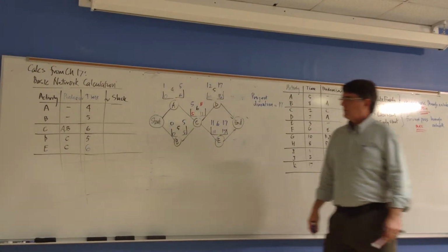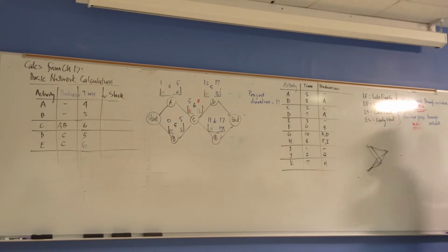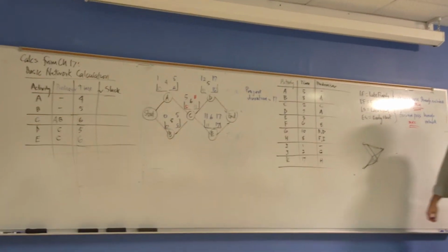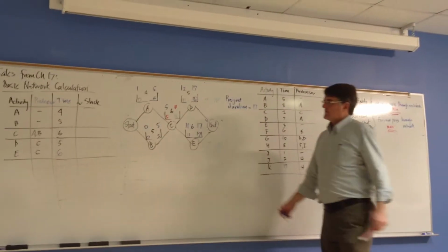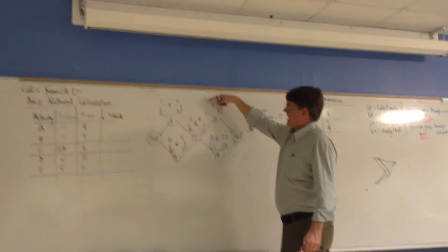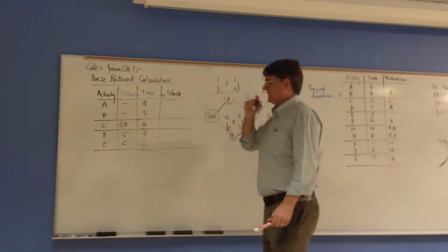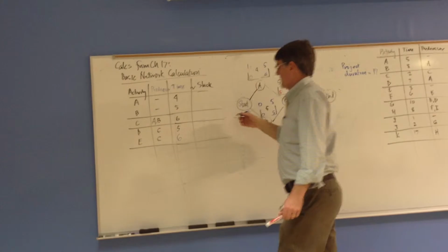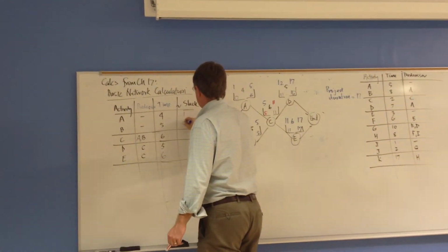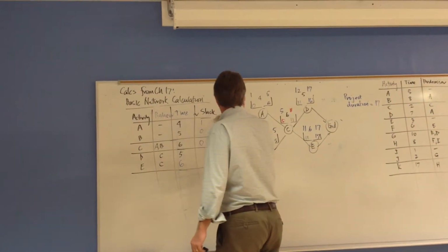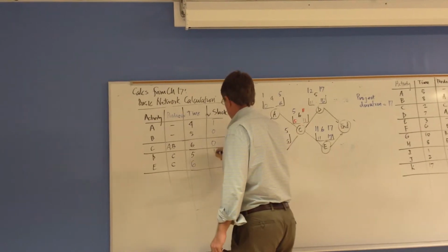All right, so I was able to get the late finish on A and B is 5, and just wrap it up. So I'm able to calculate my slacks. The slacks are just the difference between the late start and the early start on every node. So it's as follows. A is 1, and B is 0.